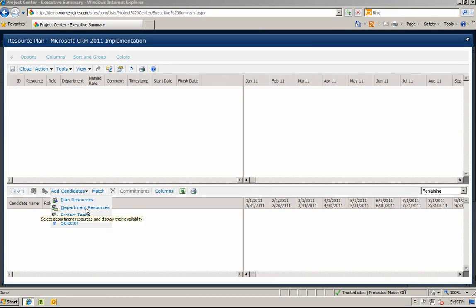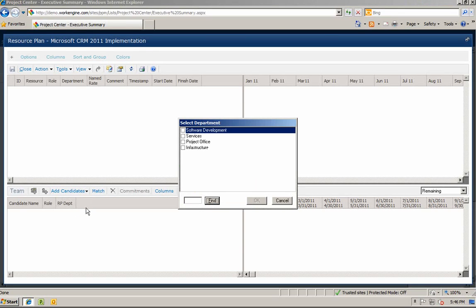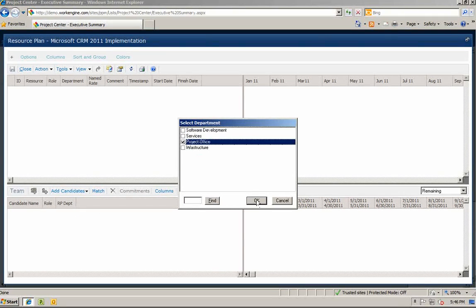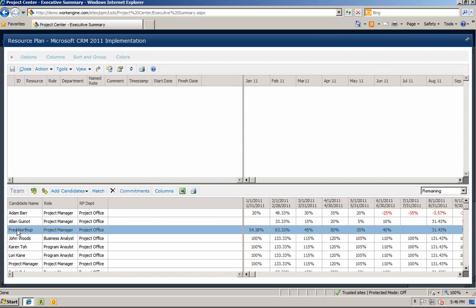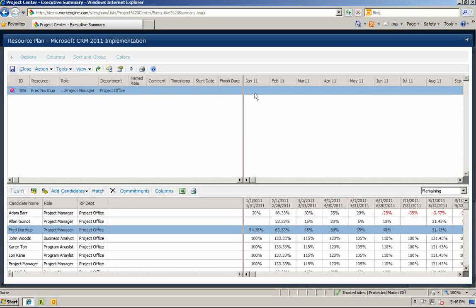Let's go ahead and search by department. Since we are looking for a project manager, we'll select the project office department. In the lower section of the resource planner, you can see all the potential candidates with their availability by period from the project office department. As you look through the resources, you will notice that Fred Northup has the most availability to manage this project. Let's add Fred to the resource plan. Now we can either enter in hours or a percentage to reflect our resource need.